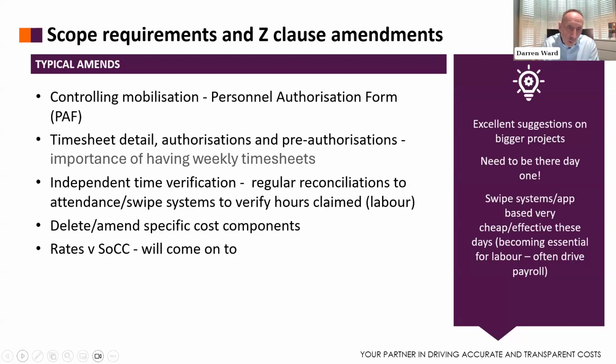So as you rightly pointed out, a contractor may bid cost plus 10% on one contract, but when they get wind of what they don't want to have paid by the employer or the client, we'll then see the next project will be cost plus 12%. They'll add on that bit of risk because of some of these subtle changes on cost component amendments. So that is relatively common.